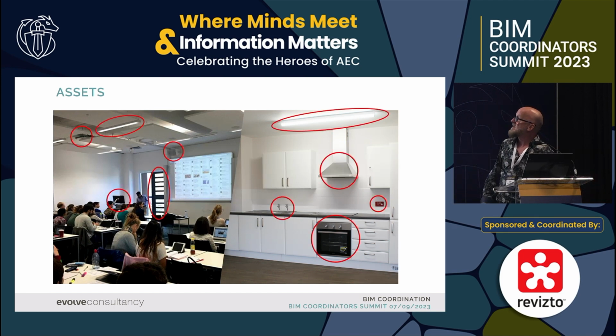What they need to know is, it's a tap. We need that because if that breaks, we can't use the water, we have to close down that kitchen, that tenant is going to be a problem. It's over here, the fire escape. If the mechanism's broken, we're probably going to have to shut that classroom. That has knock-on effects. Just two examples of it. Understand what your maintainable assets are in a wording and phrasing that people on the team and the facilities management or the tenant will understand. Not IFC whatever, it's a complete waste of time.